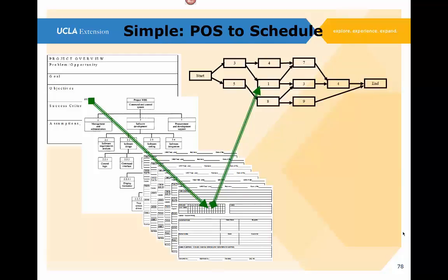Once you have the tasks all laid out, that's when we can put the network together. And you were just looking at networks in just this week. And in putting the networks together, the most important element in putting a network together from the tasks is we set up the precedents. We look at all the tasks, and we're able to make decisions about which tasks have to come first, which tasks can't be started until others are finished, what are the constraints, how do they relate to each other, and by finally putting the network together, getting all the tasks linked together in the project in the order that they have to be performed, so that the project can be done and follow-on tasks can be